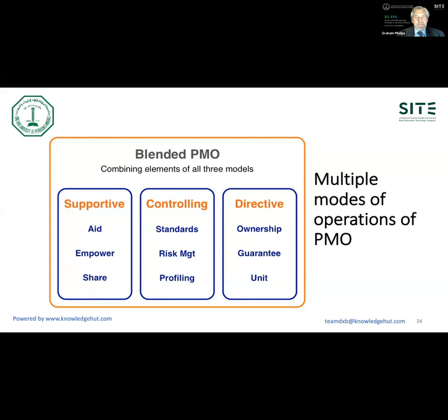A project team tends to work best around 3 to 7 people. Now, I've worked on computer project teams of over 100 people, but they've all been broken down into much smaller units. Easier to manage, they feel more able to control their own domain, and there's less hiding for problems, shall we say.